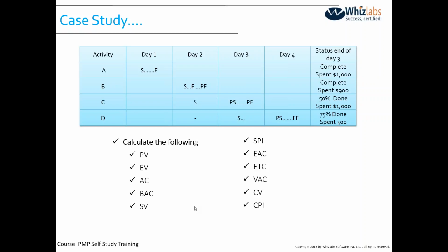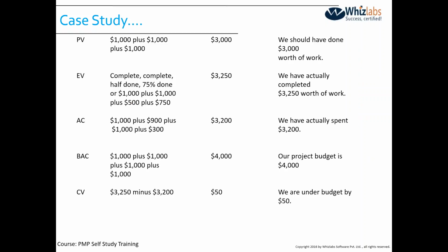Okay, so at this periodic assessment, on day 3, EV is more than PV. But at the end of the project, we would have exhausted all the planned work. So at the end, Subodh is saying EV should be equal to PV. You are absolutely right. Okay, no question. Now, based on this, we will be calculating different things.